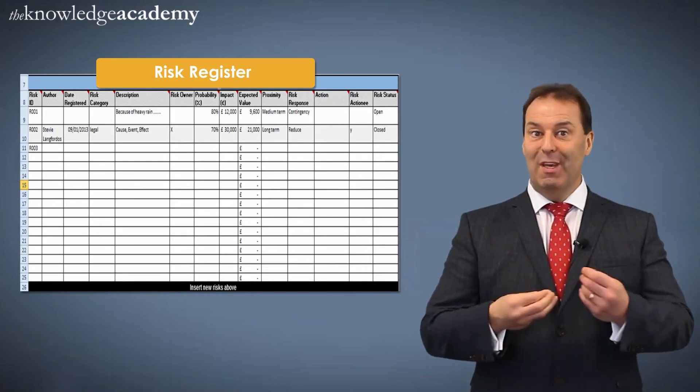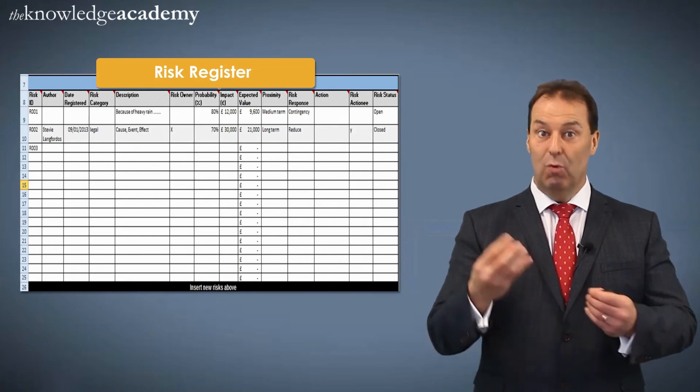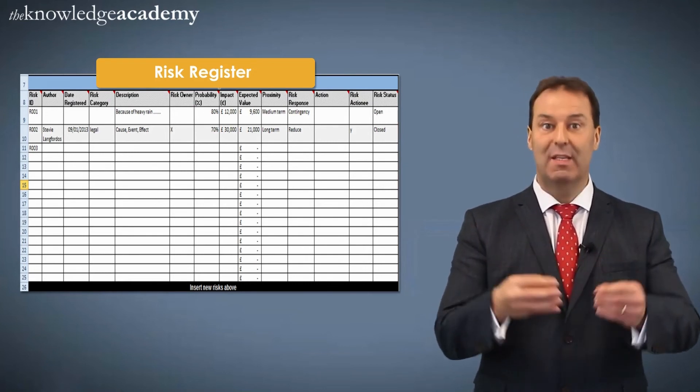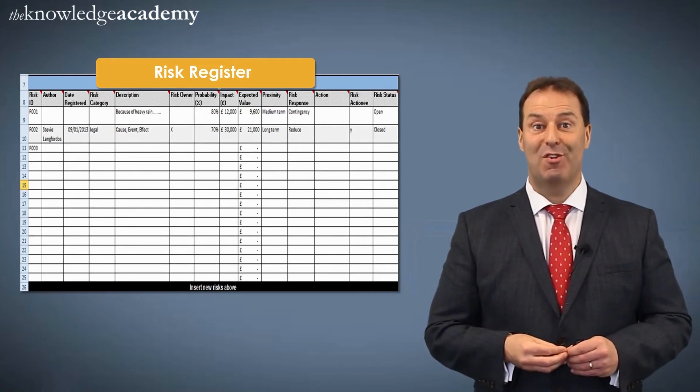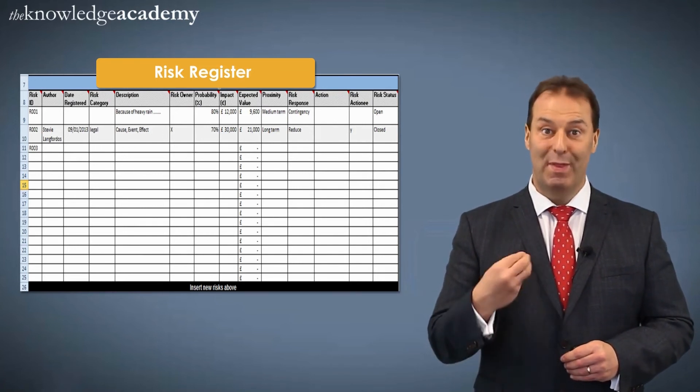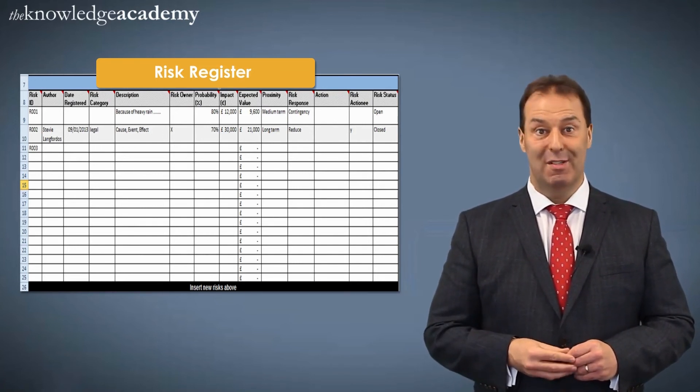Also, when we start looking at risk interdependencies or in other words risks which are linked together, you start to realise that it's far easier to track on a risk register when they're all recorded than if you start deleting them.